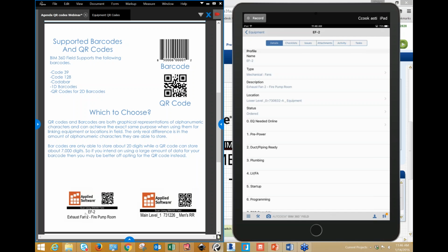We had a project in Manhattan, it was 15 stories. There were 3 wings on the building, and it was a set of luxury condos on the Hudson River. They had over 1,500 locations, and it took them almost 6 clicks to navigate all the way to the project level. What they were finding was that their superintendents were having trouble keeping up with clicking down when they create issues. So they went through and we QR coded the entire building.